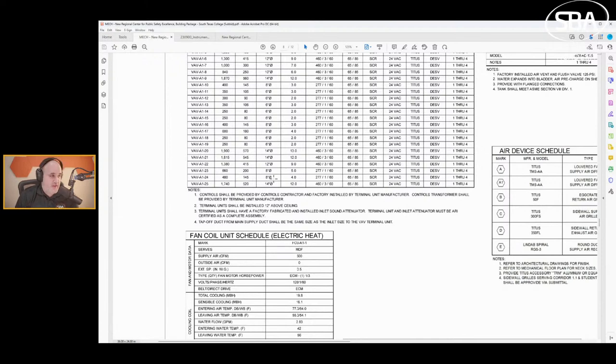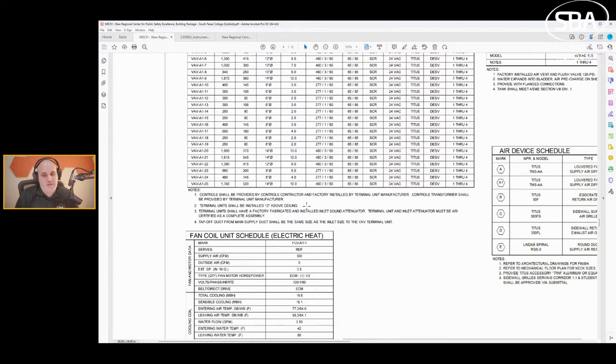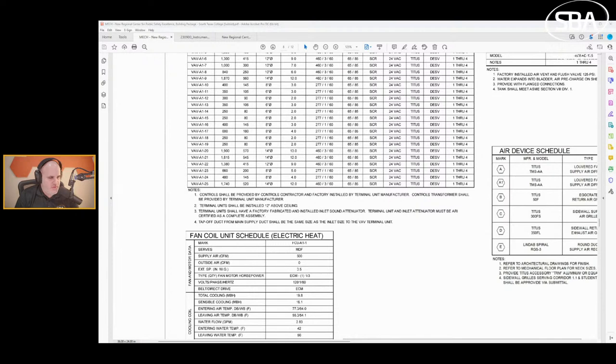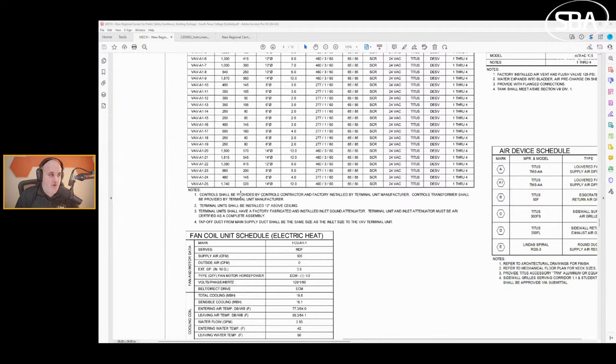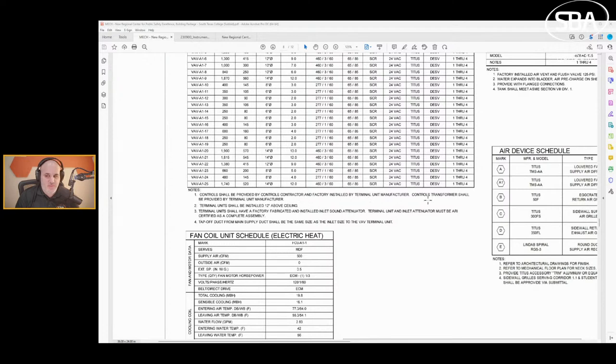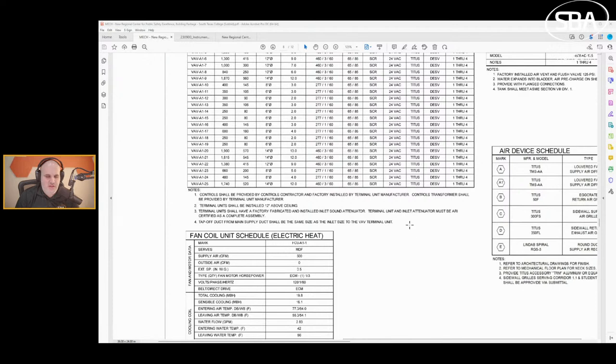At the equipment schedule, what I'm trying to do is figure out what items are going to be in scope for whatever project I'm scoping and estimating. The first thing I'll do is start to look. Usually I start from the bottom up working my way from terminal units up to the big air handlers and central utility plants. As you get more experienced you can quickly eyeball CFM and see if things match up.